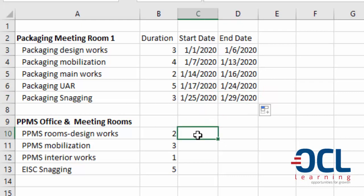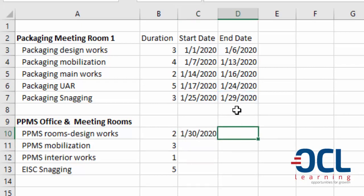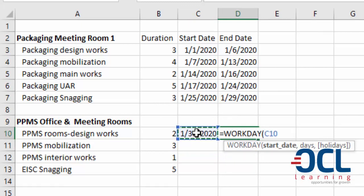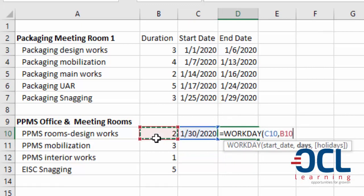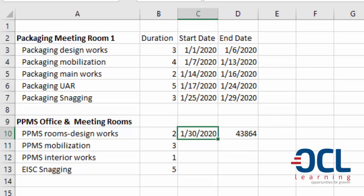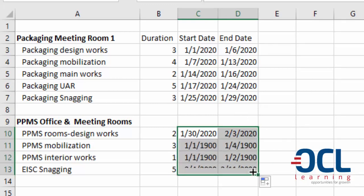The start date of the next task is the end date of the previous task plus one. After that we also include WORKDAY and say this date comma then one, so this is going to jump whenever the task falls on a weekend to the next workday. Here we are not considering holidays.